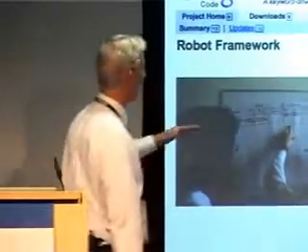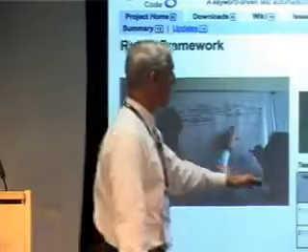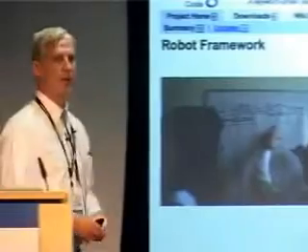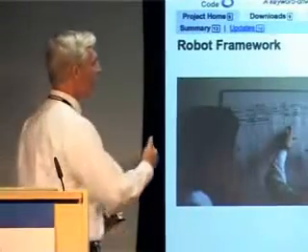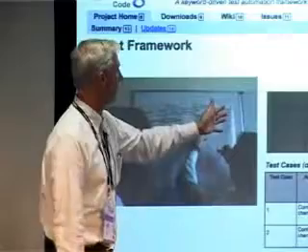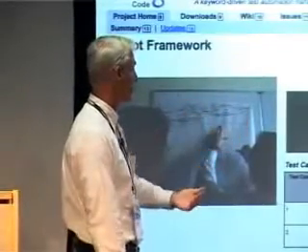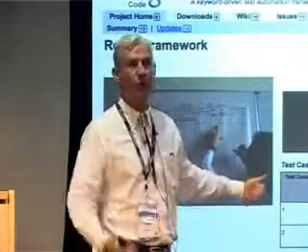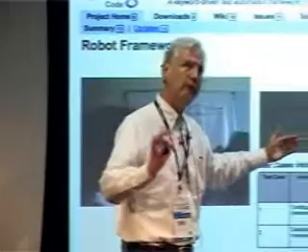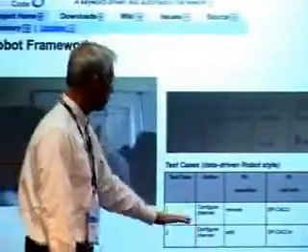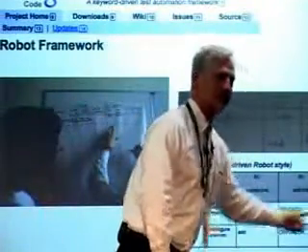And to pick up on this, one of the things that we try to do is specification by example and acceptance test-driven development. If you're familiar with the idea of specification by example, the idea is basically to express your requirements through sets of examples that are written out in tables, either on a whiteboard or in a Google spreadsheet. And then to use an acceptance TDD tool like Robot Framework or Fitness, where essentially isomorphically your representation of your examples is transformed into your acceptance tests.